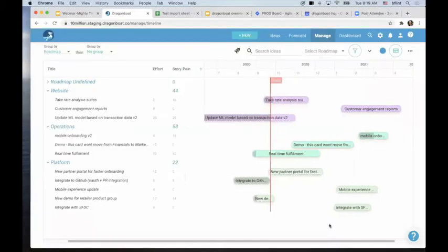What this does for you is that you have your effort, that's your high-level planning. I can also use that pulling out of Jira to know my story points, so I can see somewhat of the differences between the two. If there's a major difference, then it gives me the ability to say, hey, why is this so different? We should do something about it. That's already at the stage where, if you think about us, it's like, hey, we have high-level objectives, we brainstorm and prioritize ideas, and then we start to push to Jira.